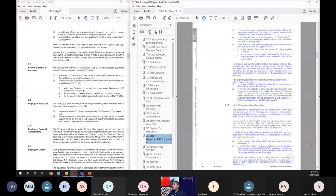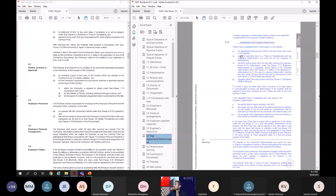Now, if you are dissatisfied with the engineer's determination, then what will you do? You have only 28 days from the engineer's notice of the determination to raise a notice of dissatisfaction.